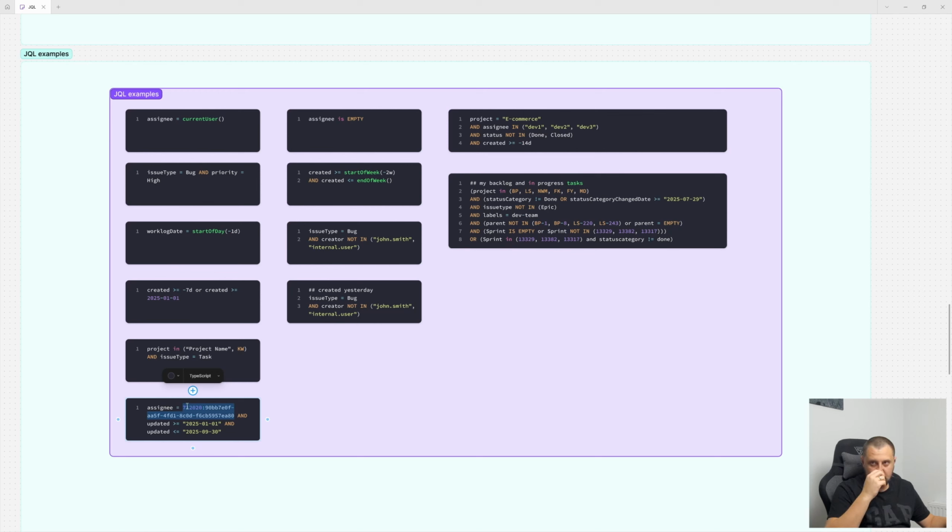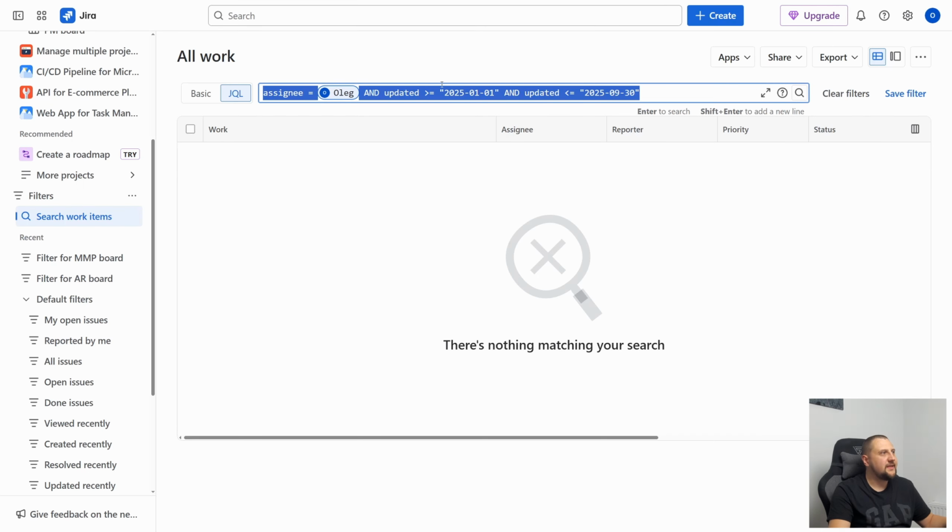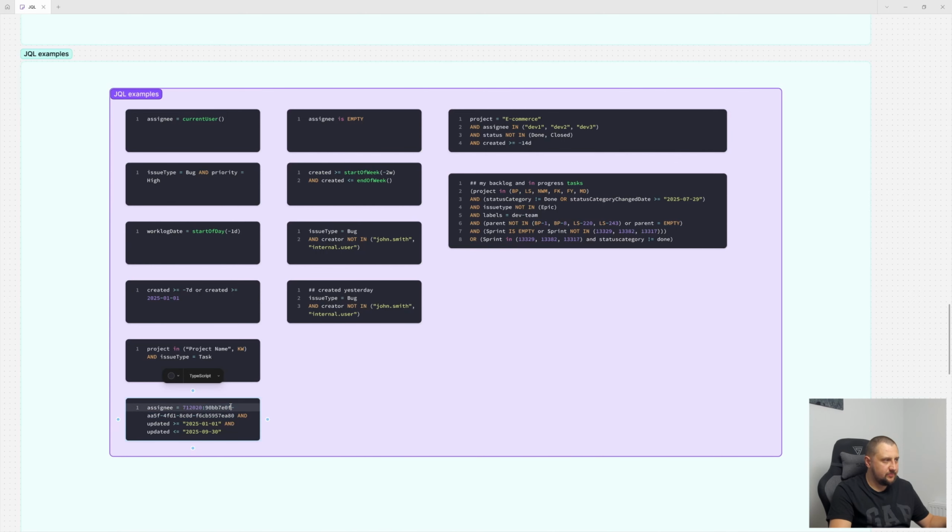So my recommendation, when you have a project with 10 or 20 users, even two, save each Jira user assignee ID to some table so you can get quick access to it. The best way is to do it in Confluence, because if you work closely with GQL filters, you will need this Jira ID to quickly find the assignee you need. Yes, Jira over here can help you to find assignee by name, but build a table with Jira IDs. It can save you a lot of time, my own recommendation.